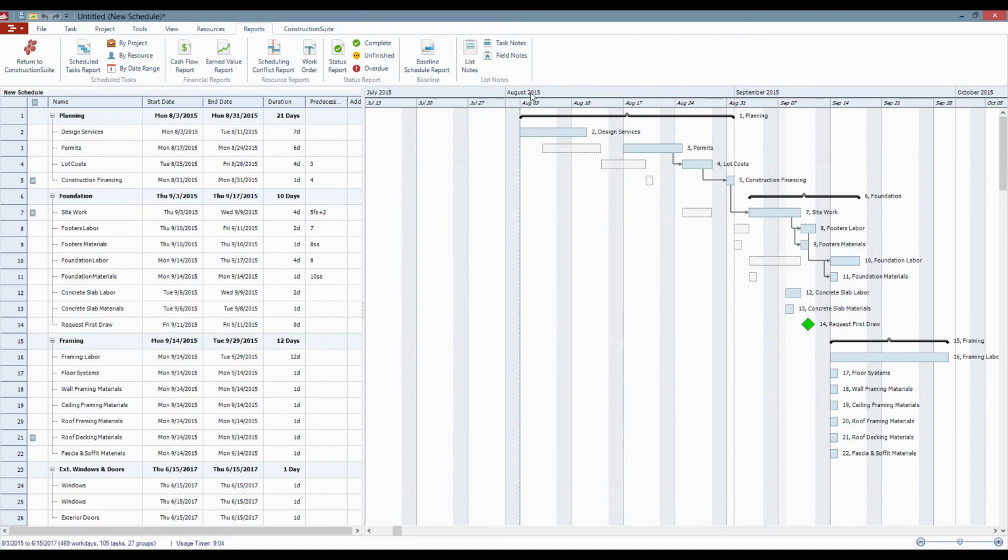So if you have one of those jobs where the schedule just got jumbled all over the place and you have a client that's coming to you and asking why these delays are all happening, you could generate one of these reports, provide it for them and say, this one small, what seemed like a small event in the beginning caused us to stretch back through the holiday season, and now here we are a month late on the project, even though it was a 2-day delay.